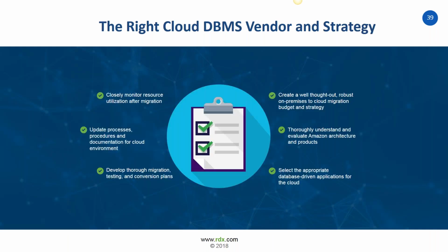If you take the time to perform the required due diligence and are willing to absorb the costs associated with the upfront analysis, you will be able to create an Amazon environment that meets your application's processing requirements. If you don't, you may end up spending more time performing migration than you expected, and the production cutover may not be as smooth as you wanted. You may also undersize your environment, which could result in performance problems. If you oversize, you'll be paying too much.